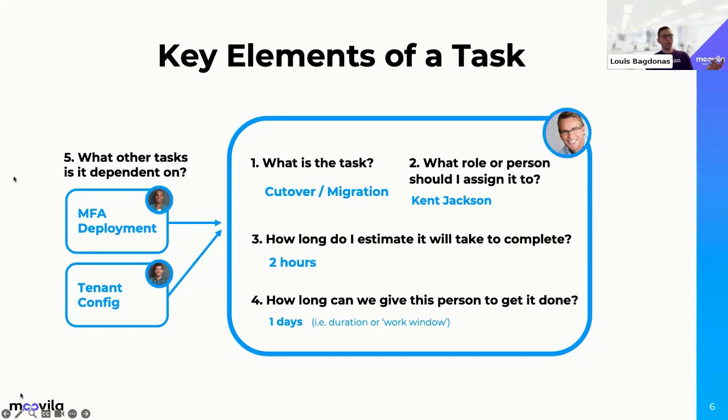And then over here, number 5, what other tasks is it dependent on? So maybe before we do that cutover, we need to make sure that we deploy MFA for all those users. And also, we definitely want to have that new tenant configured before we cut over.